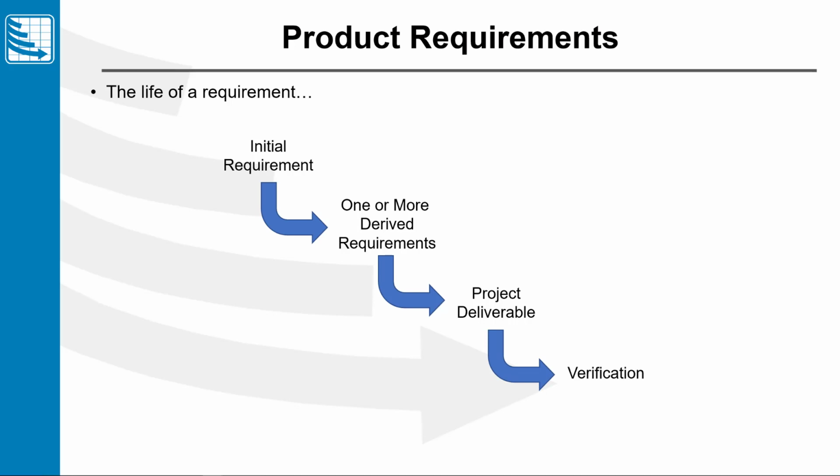And then for each of our deliverables, there's going to be a verification method and some kind of verification data that shows that the deliverable satisfies the derived requirements that trace back to that initial business requirement.